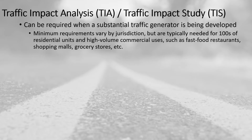That threshold is typically when you have hundreds of residential units — maybe an apartment building with hundreds of units, or a development with hundreds of single-family homes — or high-value, high-volume commercial uses.